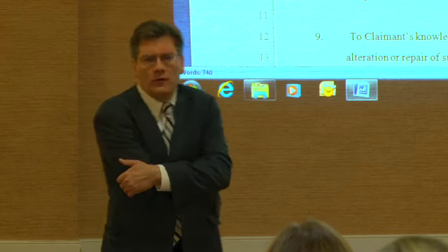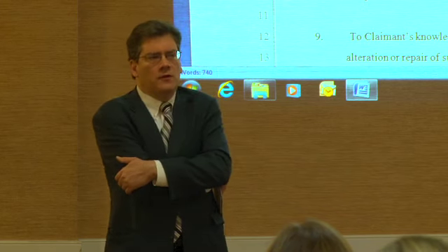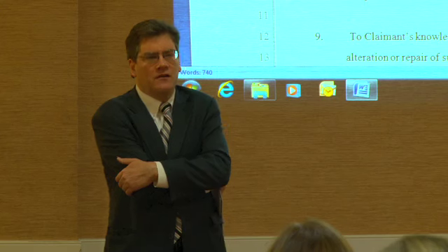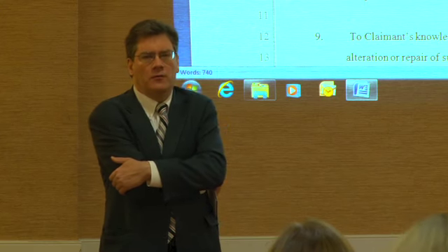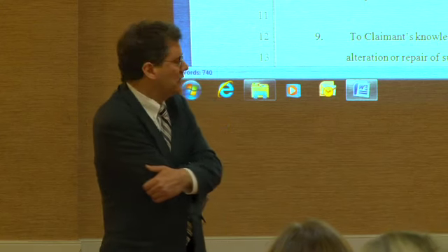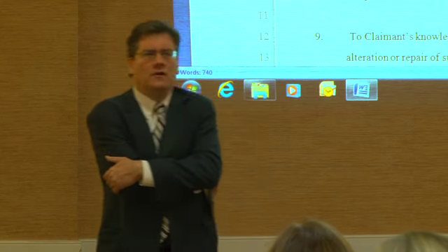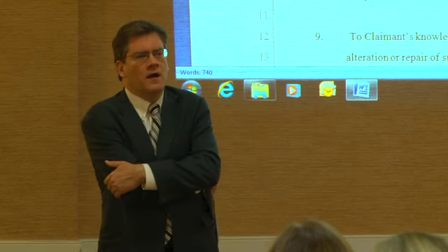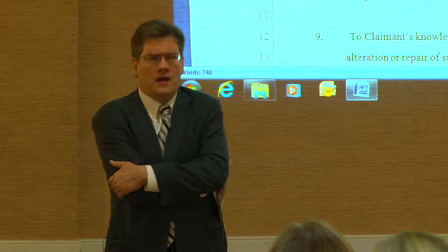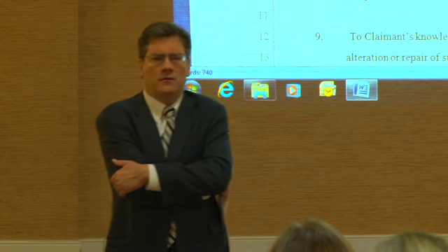Don't forget a rule that we went over, the 120% rule in the preliminary notice. You are limited to that dollar amount that you stated in your preliminary notice plus 20%. And also, you are limited in your dollar amount to the legitimate value of that preliminary notice. What do I mean, legitimate value?